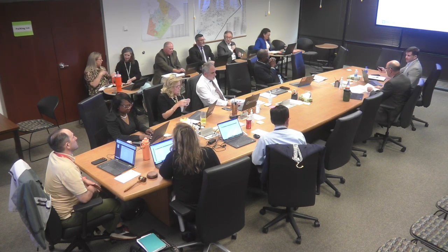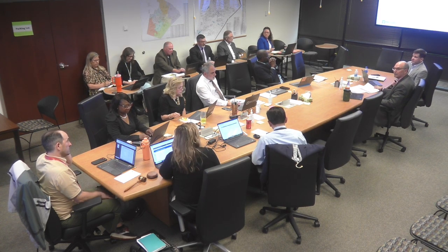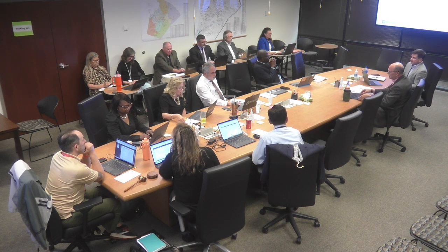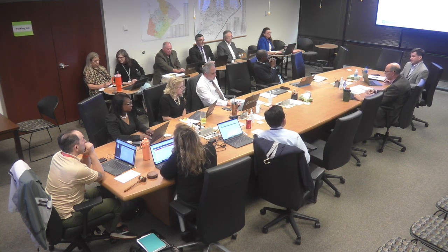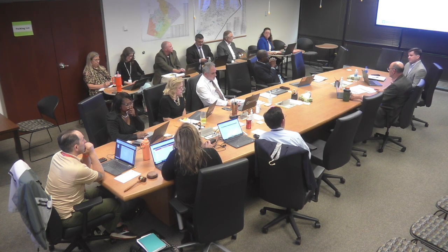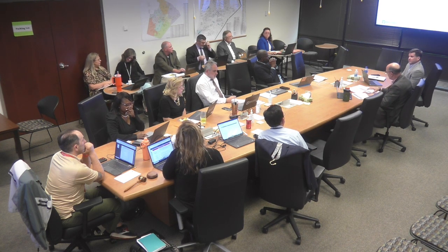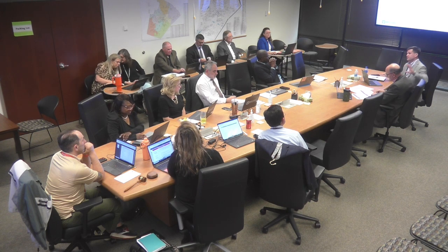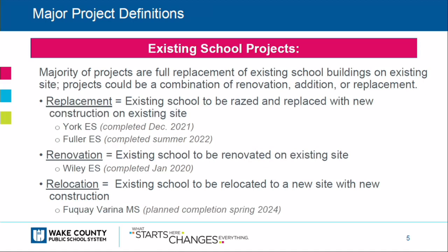Those are pretty straightforward. It gets a little more complicated when you talk about existing school projects. Although the majority of them are full replacements of an existing school on an existing site, projects could be a combination of either renovation, addition, or replacement. Replacements are an existing school to be torn down and replaced with new construction on its same site. York and Fuller are recent examples of that. Renovation, similar, is an existing school to be renovated on its existing site. Wiley Elementary is a recent example of that. And then a relocation is when an existing school is relocated from its existing site to a new site with new construction. Heat Wavering Middle School is an example of one of those projects, which we typically don't do that often.